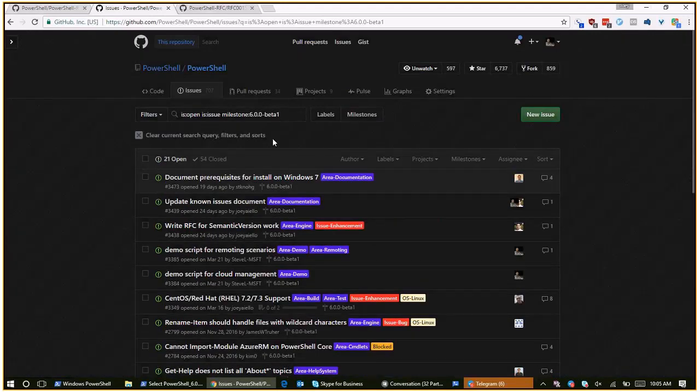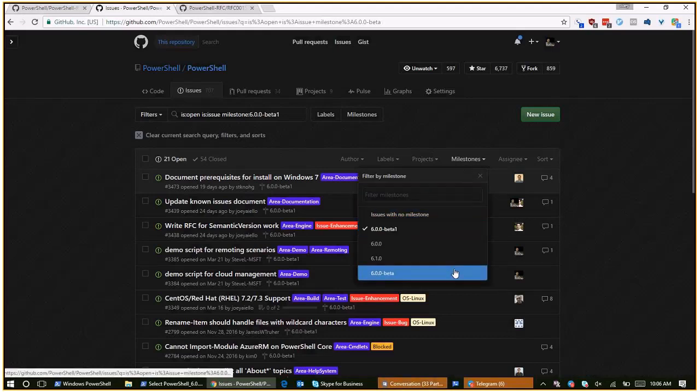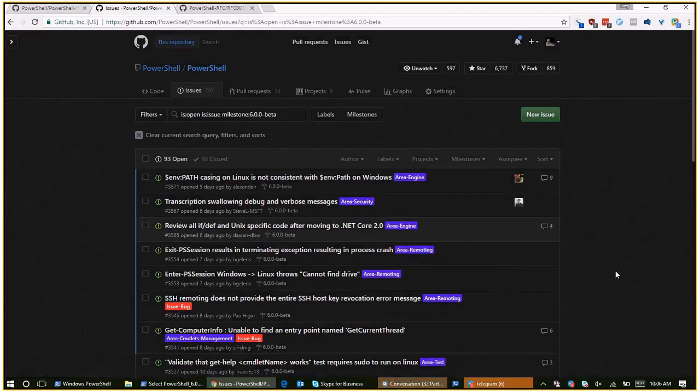After this, we want to stay on the same release cadence, release train that we were on with the alphas. And so that means a new release every 3 weeks. Yep. And we're just going to continue revving up the numbers of the betas here. So 2, 3, 4. We had a milestone called Beta 2 for a very long time, and we hadn't really thought through keeping this release cycle. We didn't want to do like Beta 1.1 or anything silly like that. So we're just going forward on the Beta 1 to 2, 3, 4, 5 train, and then we've renamed the Beta 2 milestone to just Beta, which basically means these are all the things that we need to accomplish before we can exit Beta. So we've got 93 open issues here.